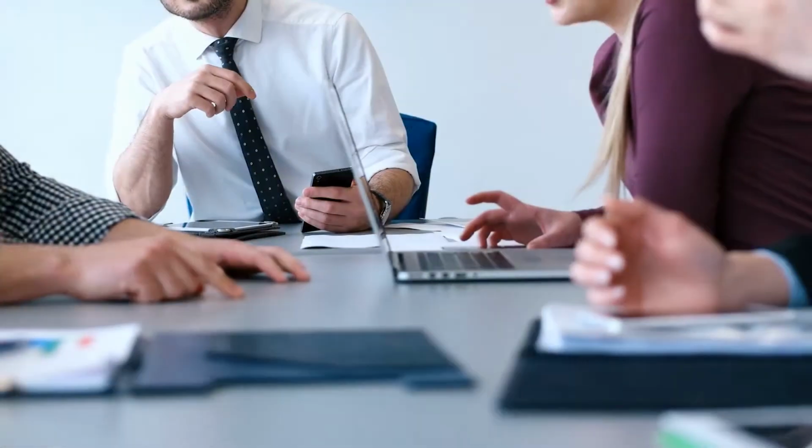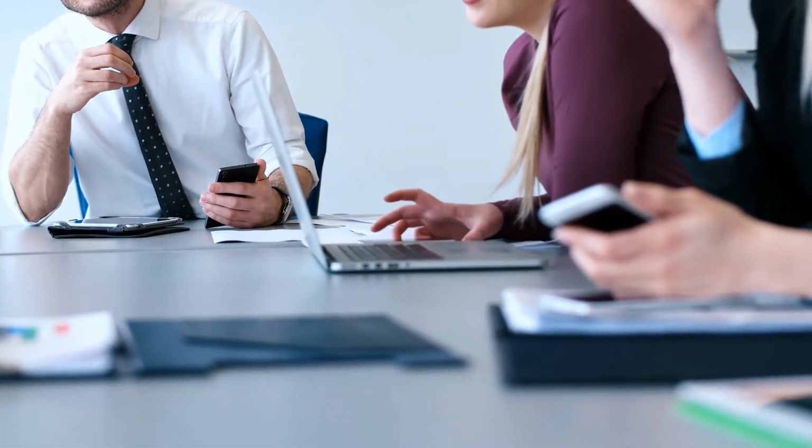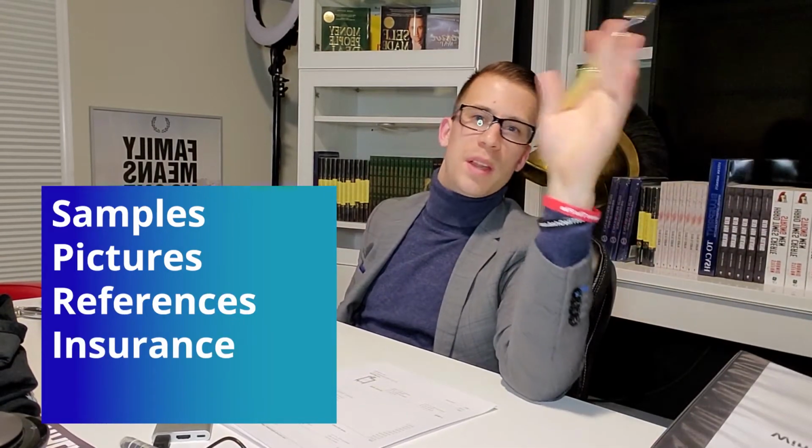So what I do initially, I won't go super in depth, but I have a meeting with them. I tell them to bring a bunch of documents to the meeting, things like a sample quote, sample scopes of work, pictures of their past work. I'm telling them to bring references, copies of their insurance, maybe like WCB clearance, and a few other things as well. If they bring all that stuff, I'm usually fairly impressed, because contractors usually don't really like to follow simple instructions. So it seems to me like I've been doing this a few years.